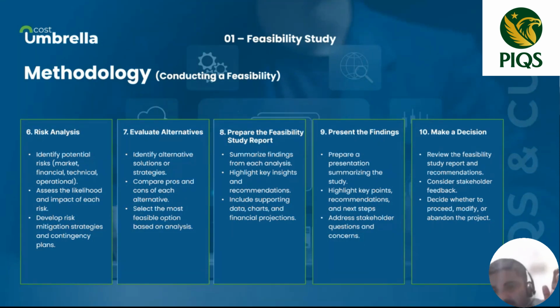For example, we'll talk from the perspective of cost. Your initial plan development cost is 100 million. Then you have a cushion of 10 million, because additional cost will come. So now 110. Just assume the cost increases more than that, let's say another 20%. You plan 100, you still have 10 allowance you can arrange. But if it goes beyond that, obviously you have no option. You are at full capacity of borrowing. So you have to stop this. So this is called risk analysis, right?